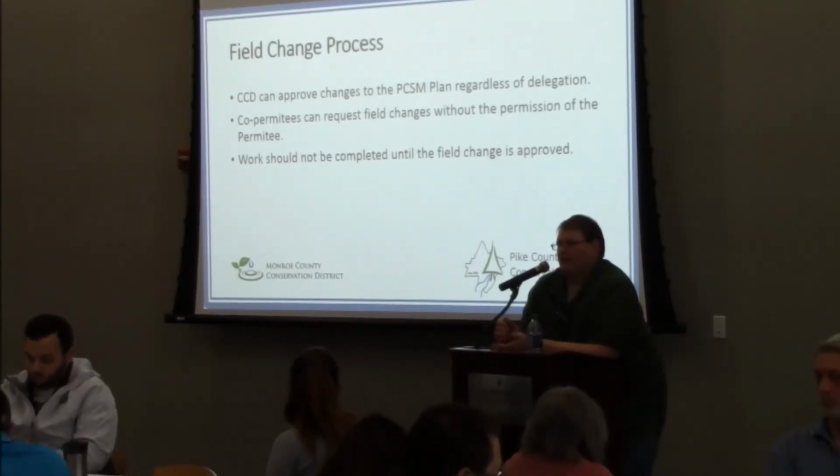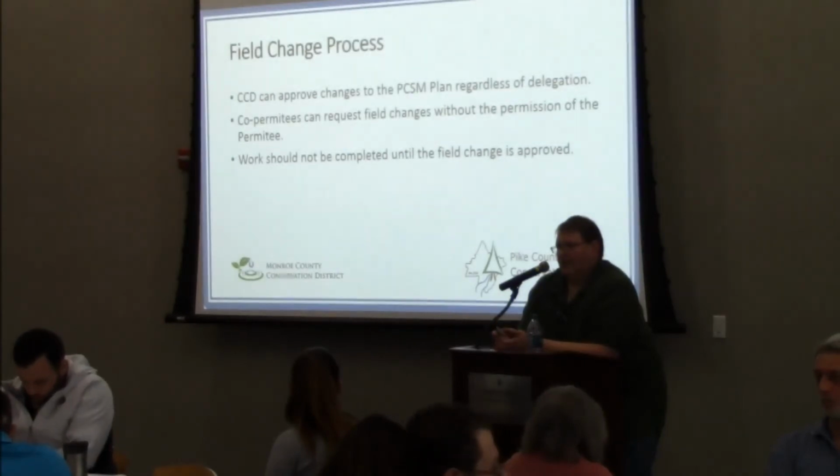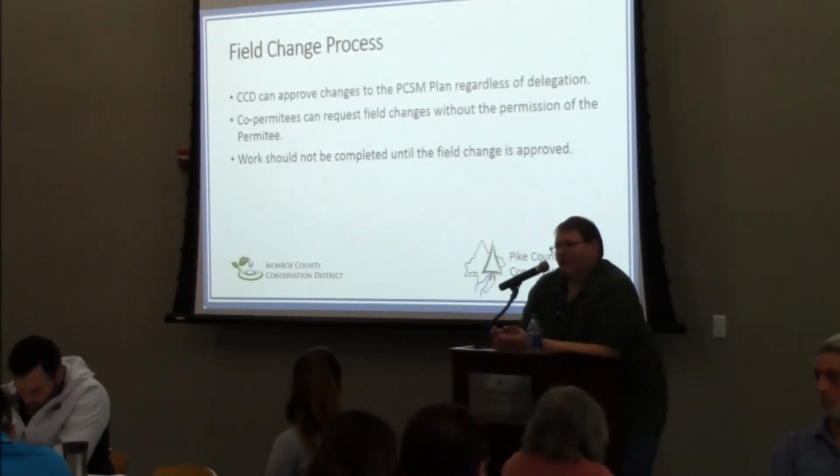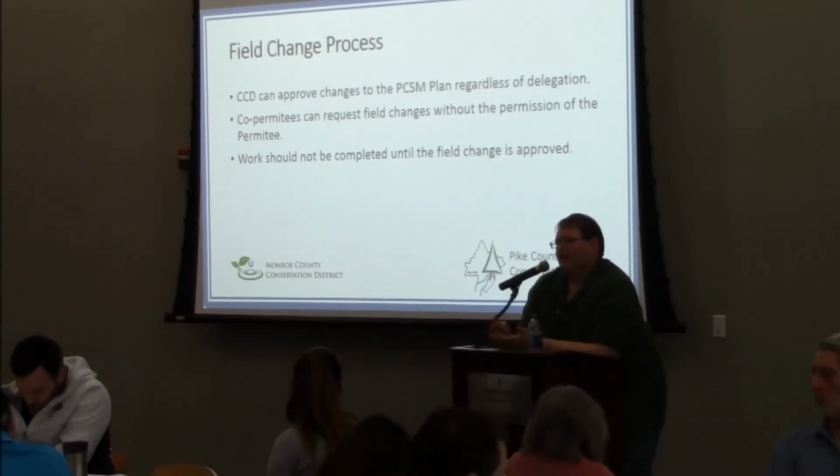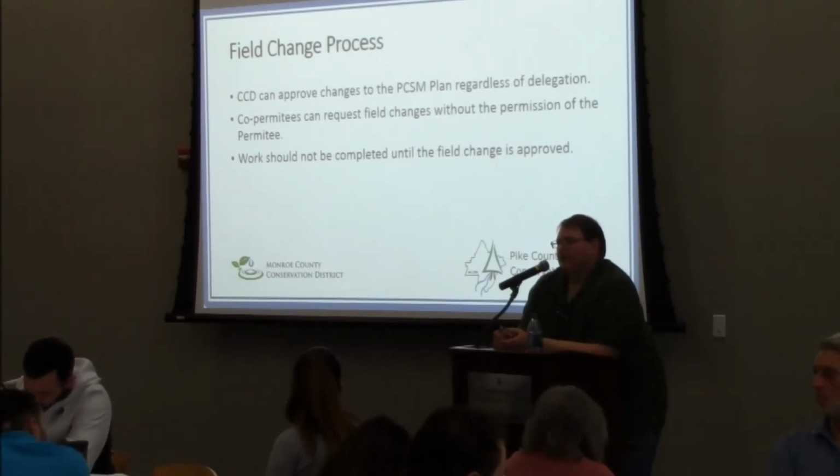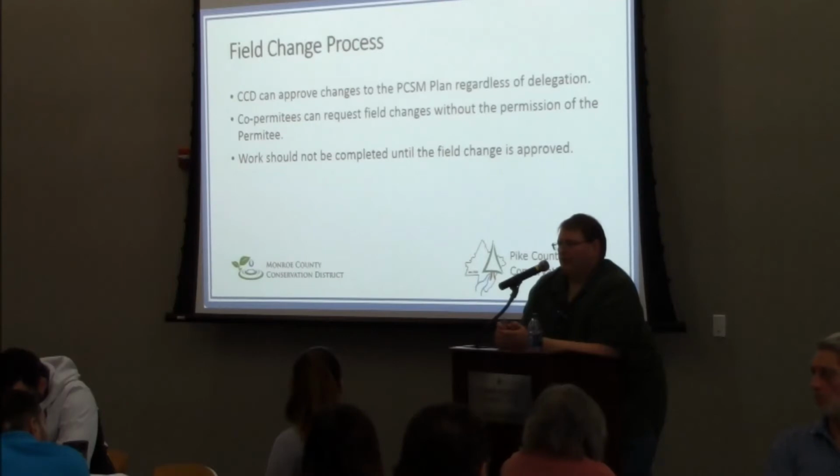Oftentimes, field changes are made, and well, now we need to look at it with kind of a different lens, and it's probably not going to be a field change. It would probably be a minor mod at that point, because we didn't get a chance to look at it ahead of time, and it's something that we're probably going to need to look at in a little bit more depth. So make sure you get those approvals before you do the field change.